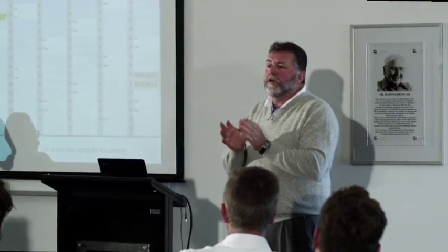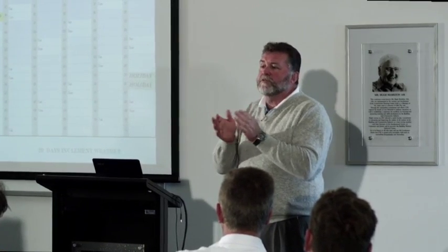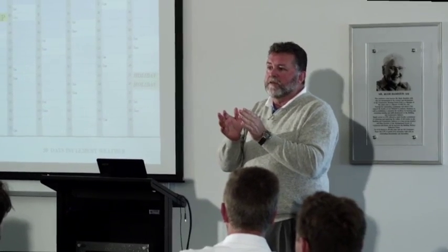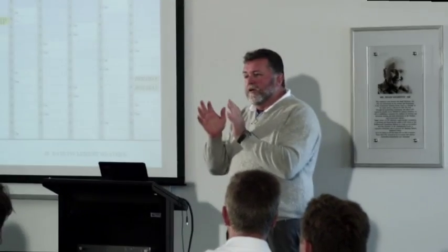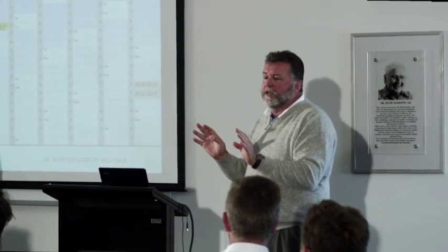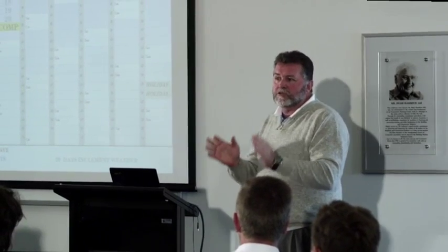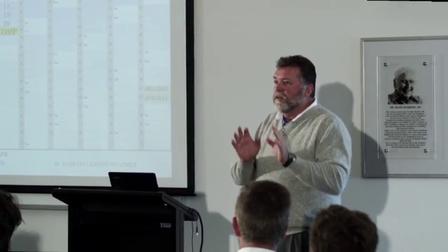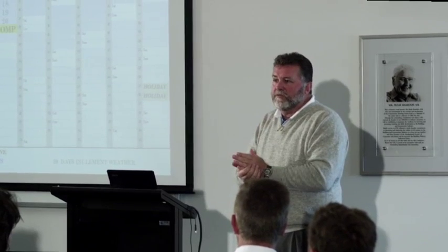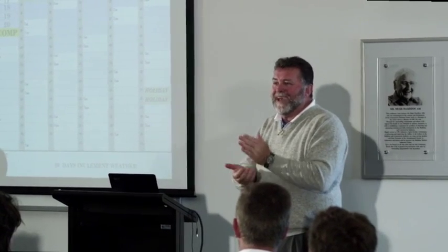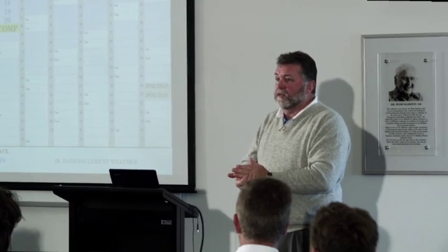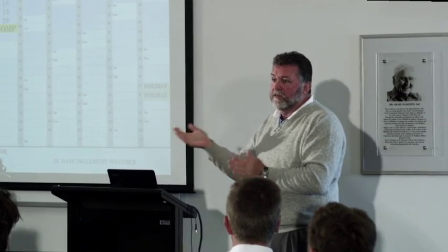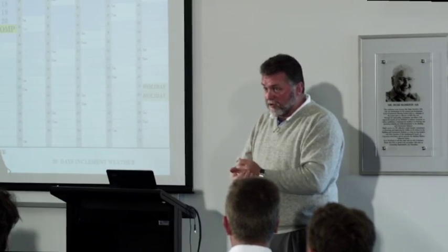Because there is another part to that answer too. The alternative the owner actually has is to be able to terminate your contract because you're in breach of the contract. And it's not so much the contract. What you've got to understand is what is in all the contracts that Paul's explaining here today is in the Domestic Contracts Act. It is not something that someone's written up outside of legislation. The legislation says that you must give the owner a contract information statement at the time of signing the contract. At the time of signing the contract, you also get the deposit, as Paul said, the 5%. So that's at the time of signing the contract.